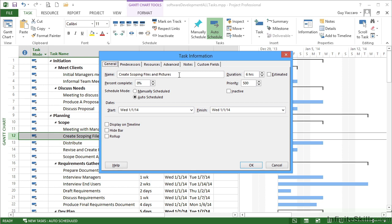Here's the name of the task that I can just click in and change. There's the duration box that I can then click in and make any changes. Again, the up and down arrows will keep you in the same time split, so I'm in hours and it goes up and down. If I want to change to days or minutes or weeks, then I have to type over the top.